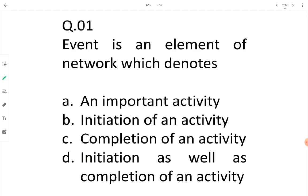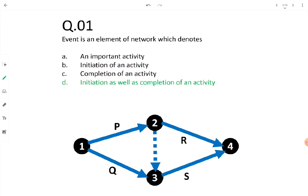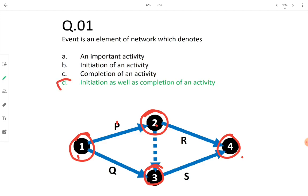An event neither requires any resource nor any time period. In the given diagram, events are 1, 2, 3, and 4. Events do not require resources or time, but activities do. Activities require resources, materials, and time for their completion and progression. In this network diagram, events are 1, 2, 3, and 4, and P, Q, R, S are the four activities. That's why option D is correct — it is initiation as well as completion of an activity.